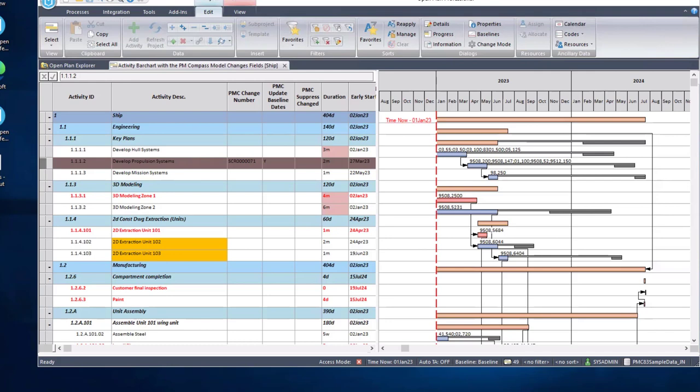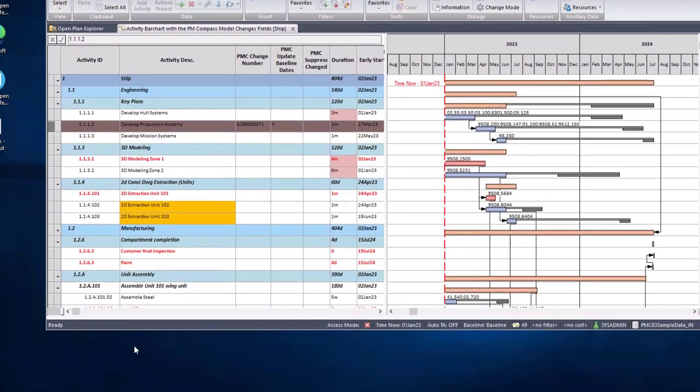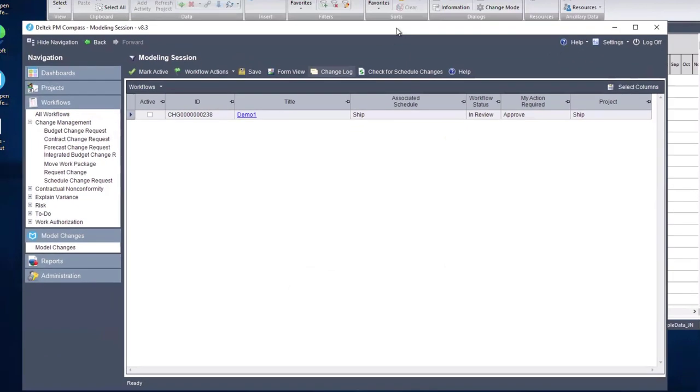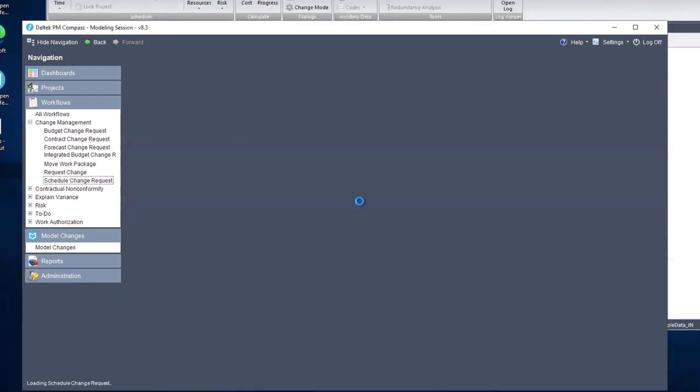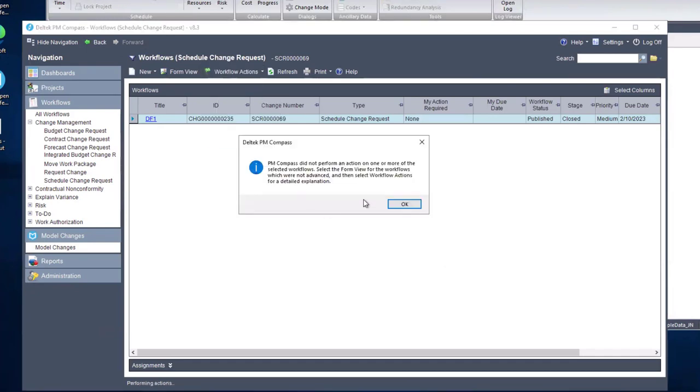No, that looks good. The one thing I would probably add is a little bit of how it's calculating the time phase data. You'll want to, in COBRA, export the calendar to Open Plan. And if you've done that prior to a current version of COBRA, you'll want to do it again, because the export to Open Plan was missing the time of day. And the most current CU release of COBRA is adding that time of day automatically for you.